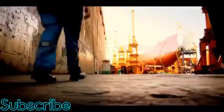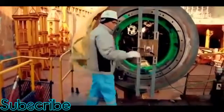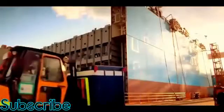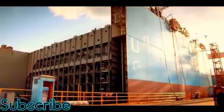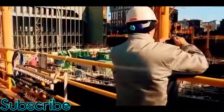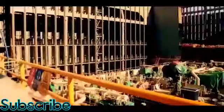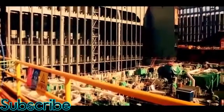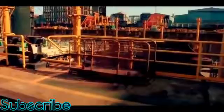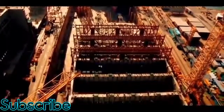But for all the progress, Soren worries that the project is falling behind schedule. There should have been 5 rings in the dock, but we can only see 4. Another week before it's down, so we might be a week delayed. With just 4 blocks in place, it seems that the goal of delivering the world's biggest ship on time and on budget is already under threat.